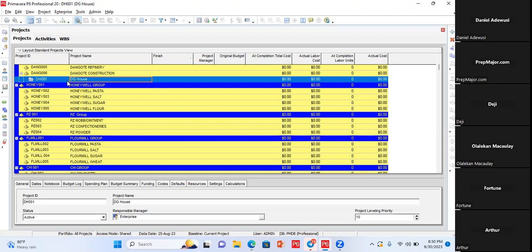Some companies have special days. Some company will say, well, this year we are 60 years old by October 2nd, so we won't be working. So you will add that to the statutory or UK holidays that they already have. So that day, you will need to make it an exception.